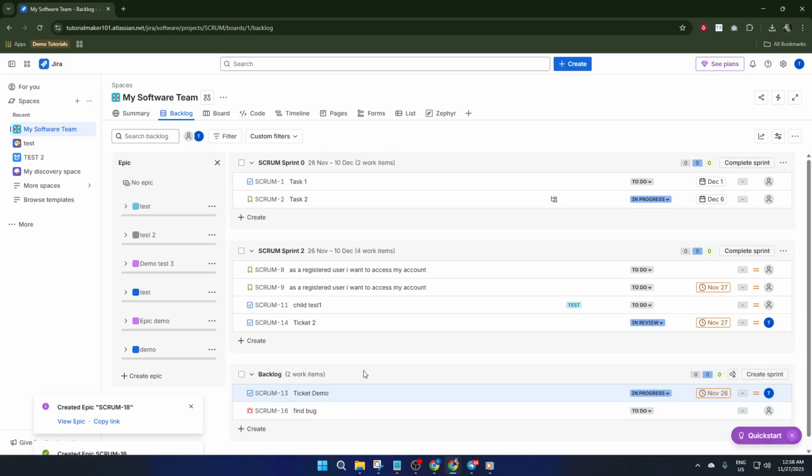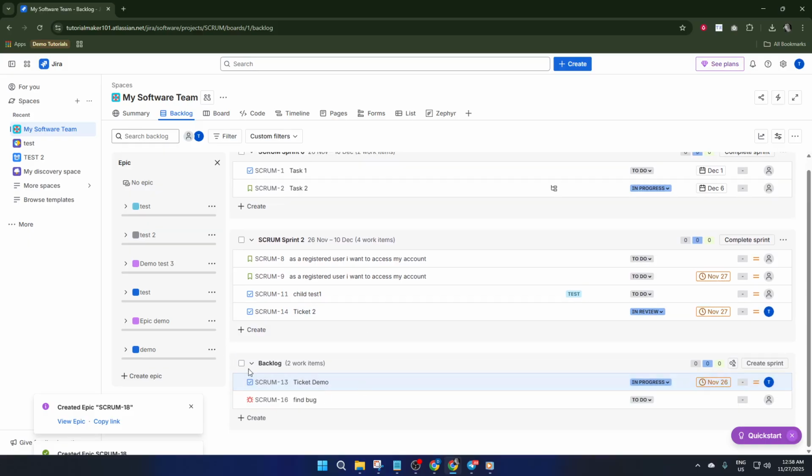First off, you'll want to create and organize your work inside Jira. Think of Jira like a digital bulletin board where each card represents a piece of the project. Say you're building a big new feature. Start by creating an epic for that feature. An epic is like an umbrella. Everything related to that big goal fits underneath it. Break the epic down into stories for smaller pieces, each describing a user-facing part or technical requirement.